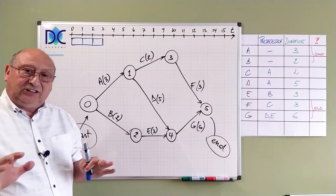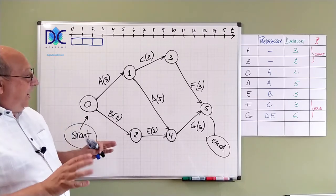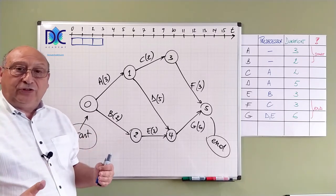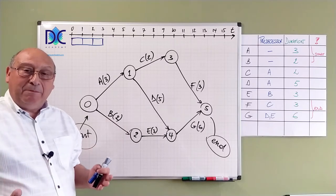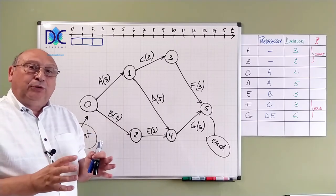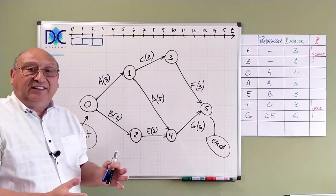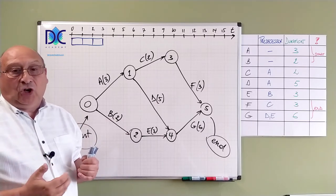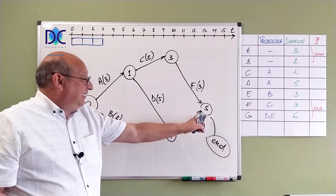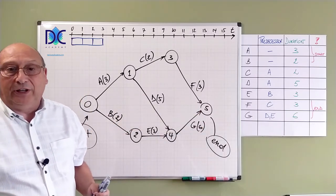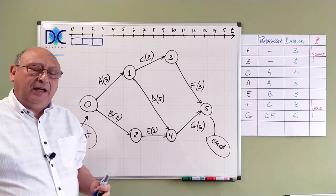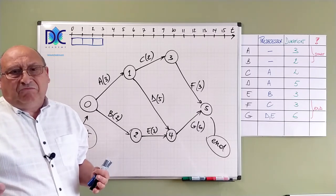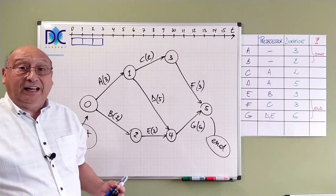And later in the next video we will see why some people who are using the precedence diagramming method try to put some event, some activity at the beginning and at the end of the project. Because they like these end points. Basically we don't need them. But basically those are also what we call milestones.